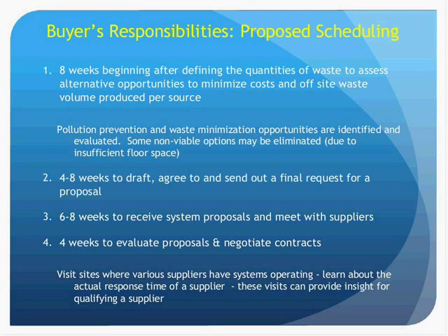Following that, another 4 weeks may be necessary to evaluate and negotiate a contract. Suppliers should be offered the opportunity to collect samples used during treatability study prior to issuing their own performance guarantee. Next slide, please.